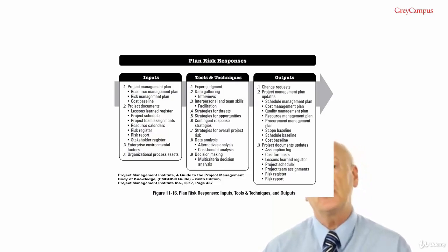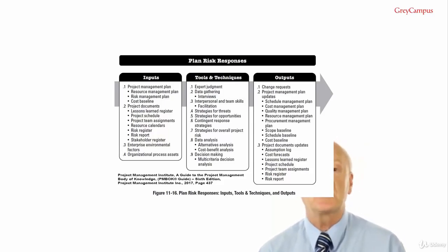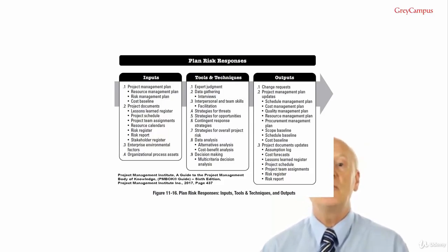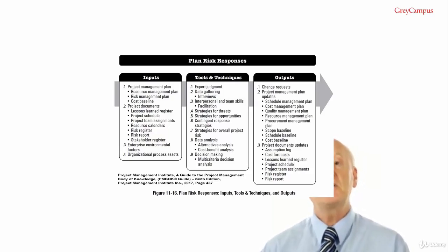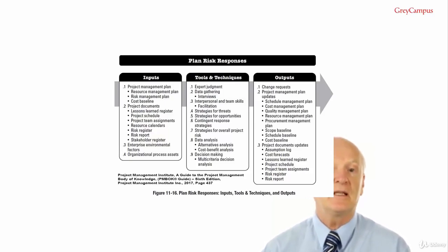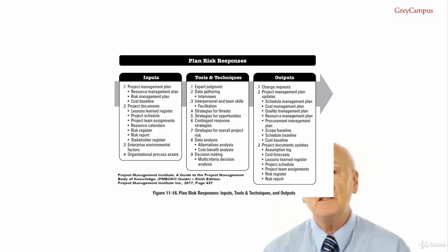Location 1 and Location 2 have been assessed as very safe locations. Location 3, however, is to be built in California, which is the earthquake capital of the US. No matter how you plan, the risk of explosion through earthquake remains high. So you avoid the risk by deciding not to build a plant in California. As there's no plant, there is zero risk.